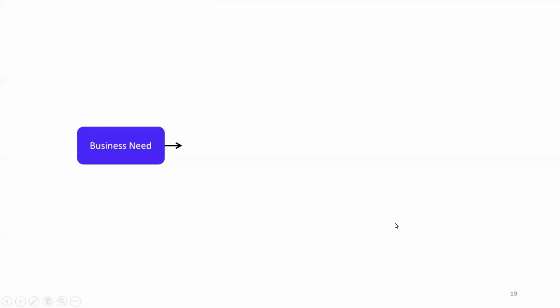Okay, so now let's say we want to develop the project charter. So before the charter, what happens? Before the project charter happens, the organization looks for a business need, or what project it should be working on. So there should be some business need for them to start a project. First comes a business need, then based on the business need, a business case is prepared, and a statement of work is prepared.